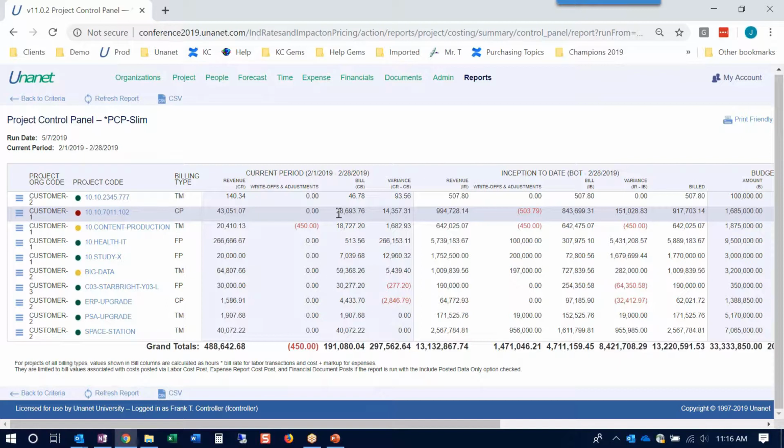So we know with non-bill projects and fixed price projects, when we assign people to a project, you have the ability to associate a bill rate via that assignment, even though for fixed price and cost plus and non-bill, it doesn't really drive any revenues, right? You're not generating an invoice off of those values. It's just purely taking those hours, multiplying that bill rate.